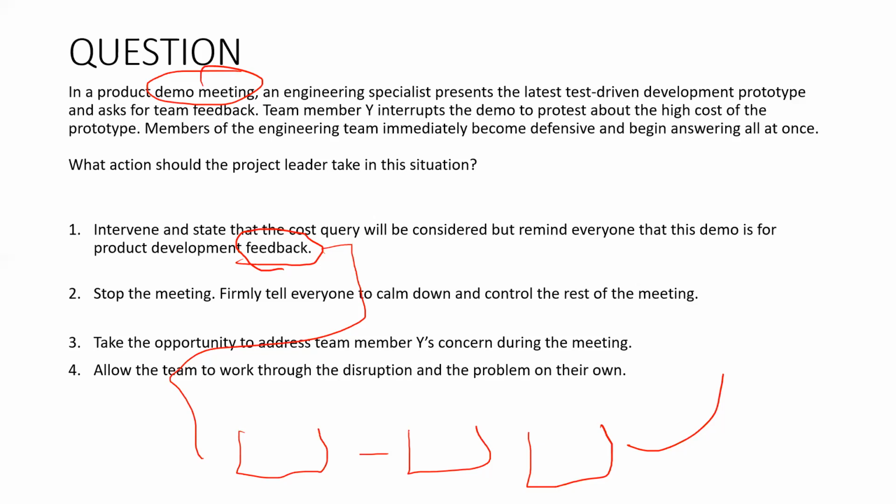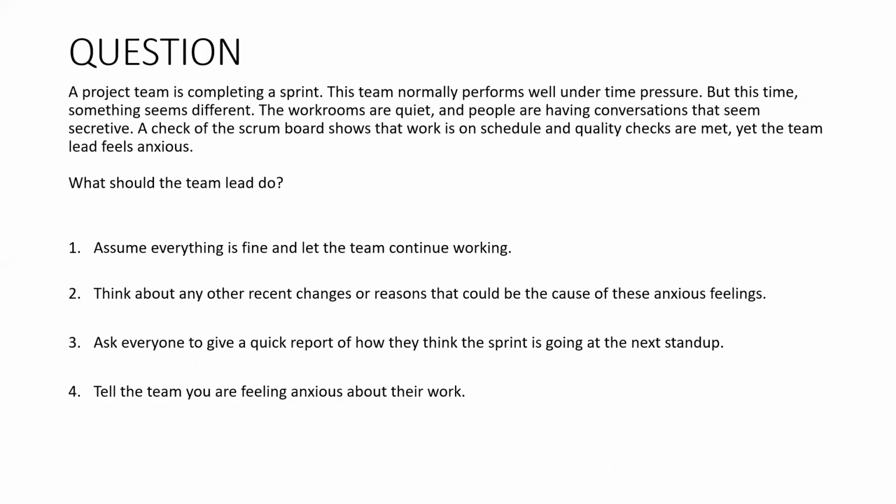How would you do it in Agile? For whatever is accepted, we will release, and whatever remains we will put in the product backlog, and we will start iterating on that again. Whatever is accepted we can release, and the remaining we can put in the product backlog and prioritize again. This was actually my point to ask, because the release plan is issued in the beginning.